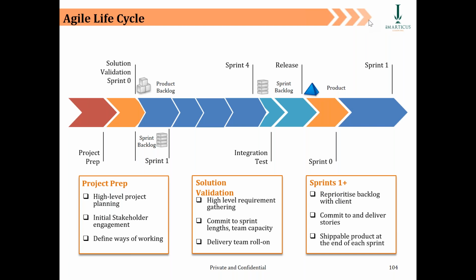Right. So Rishabh, one of my principal answers comes from the previous situation when I said agile or otherwise, it doesn't change your role. That's part number one. Now, let's understand it from a top-down perspective. We have covered the mechanisms of change in agile. The larger requirements are broken into smaller ones, which shortens the turnaround time of changes hitting the production system, because they are now more doable. They are quick fix cycles which can run on sprints of a couple of weeks, so there's no need for a prolonged life cycle management of the changes. That is one of the fundamental differences between agile and non-agile. That's part one. Second, look at this slide, right?